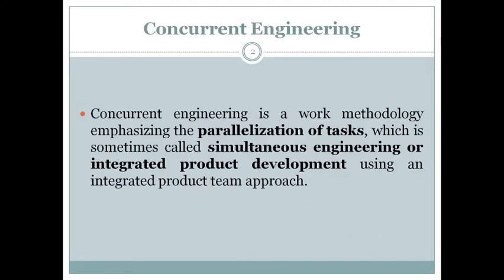What is the meaning of concurrent engineering? Concurrent engineering is a work methodology emphasizing parallelization of tasks, sometimes called simultaneous engineering or integrated product development using an integrated product team approach. The key concept is parallelization of tasks — many works are done at the same time. We don't wait for one activity to be over before the next is started. Tasks work together in parallel so that more work can be completed in less time.